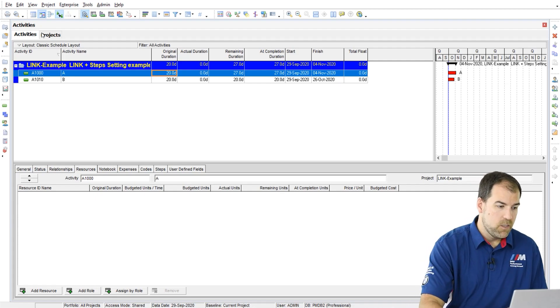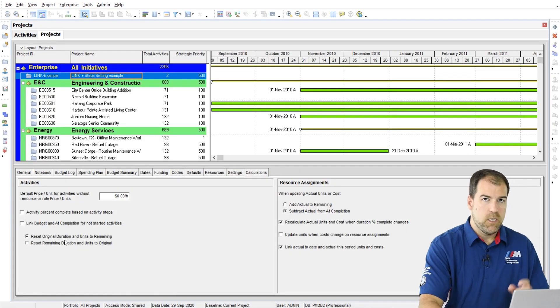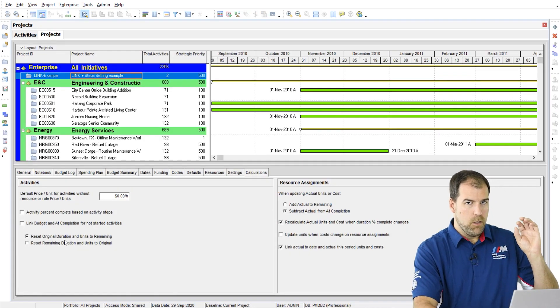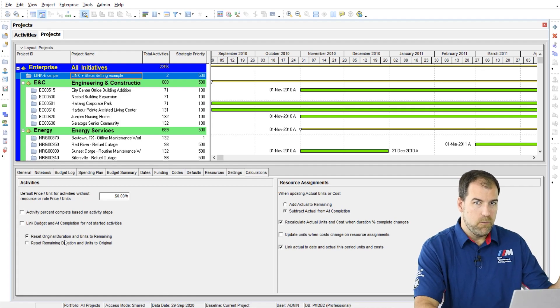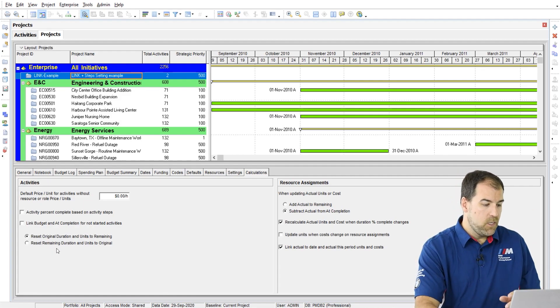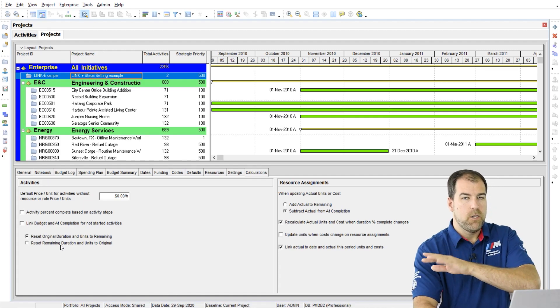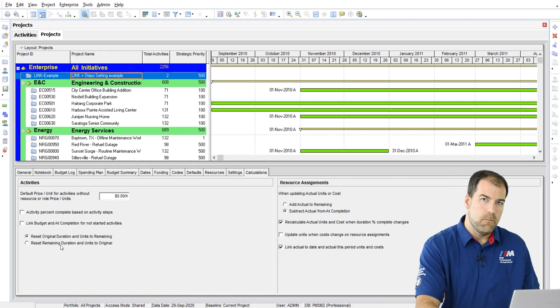So the first one is to keep original duration values and propagate them. And the second one is to keep remaining duration values and to propagate them backwards.